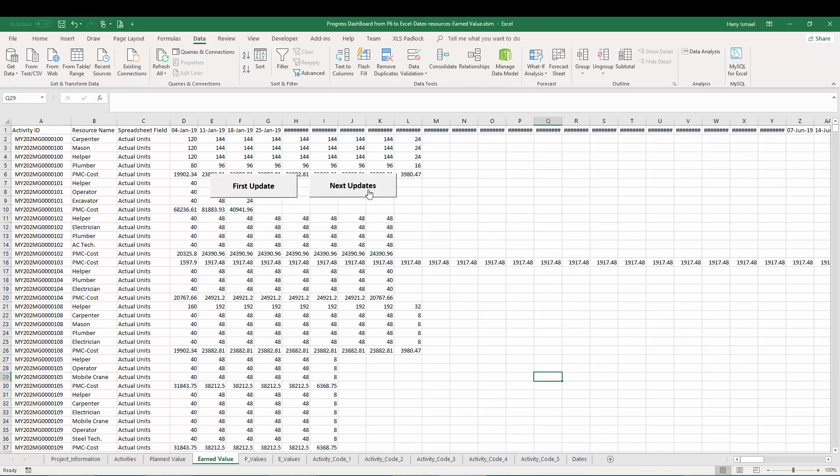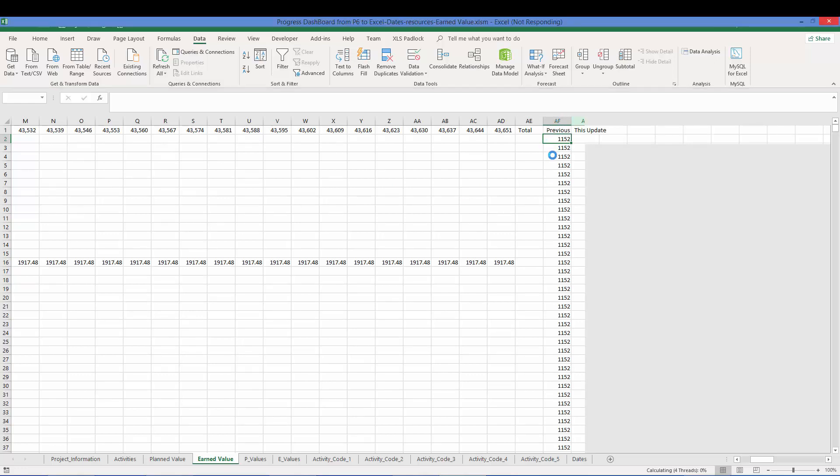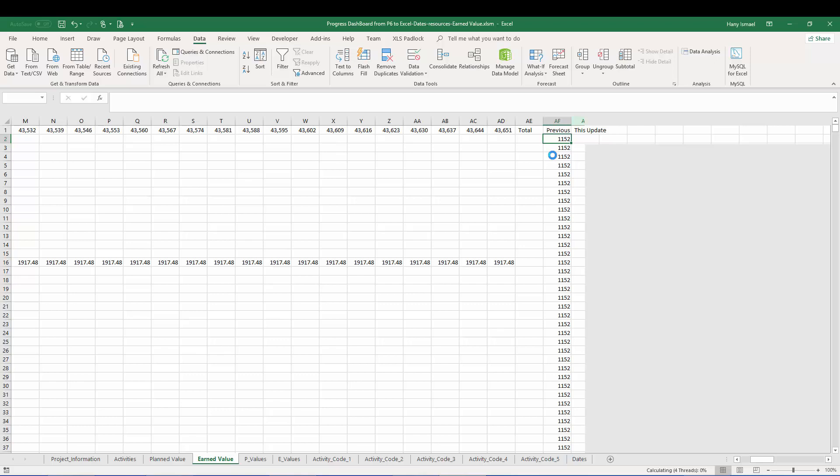In this time, I'm going to use next update. As I explained to you here, it is showing the previous. So it will calculate the previous from your database. Then it will get the variance between the previous and this update and only this variance will be loaded to the earned value sheet. It's very useful to build a real data or a real situation. What exactly happened? What was the actual progress in every week? As I told you before that Primavera doesn't do this. So we have a benefit here of using the Power BI rather than it is fast and more powerful in reporting and have too much options. Also, we have the option to show the actual progress every week.